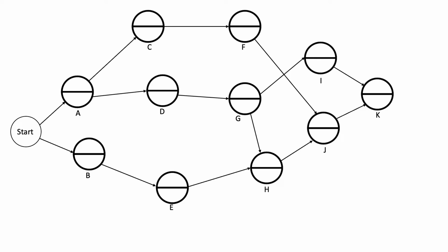This is our starting point. I'll represent each task with a node that is connected with an arrow to any task for which it is a prerequisite. We can start A and B right away, and going from there we can build this network. K is the last thing that needs to be completed, so from there we can progress to the end, attacking the British fort. I'll also label each path with how long it takes to complete the previous task. For instance, it takes 6 days after starting A before starting C and D, and so on.